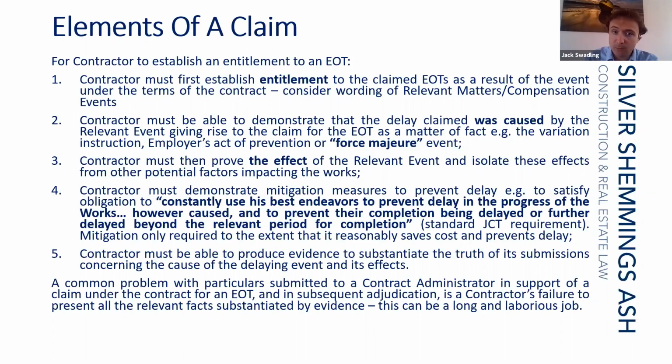So you're discussing what caused the delay event in order to establish the entitlement to the extension of time, and then the contractor after that needs to prove what the effects of the relevant event are in terms of completion of the works.